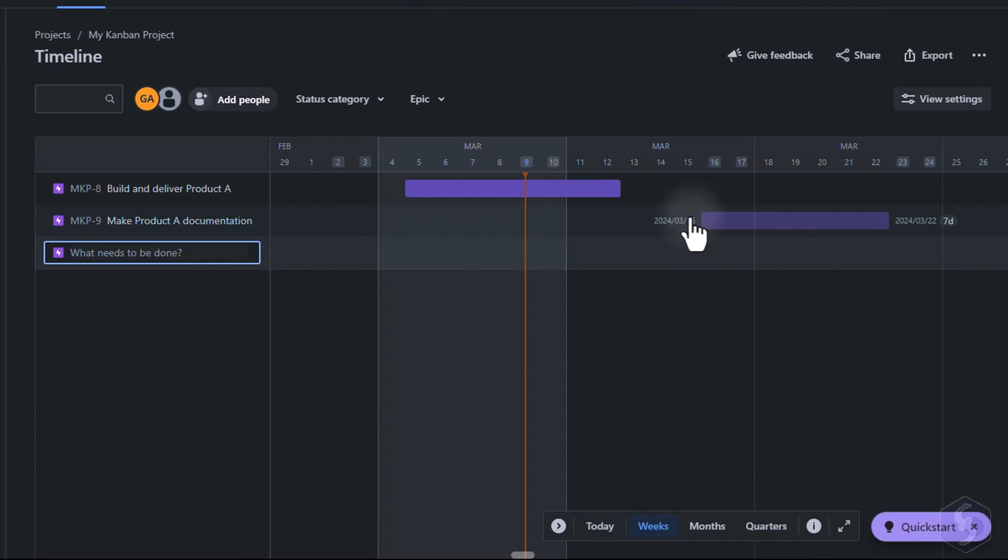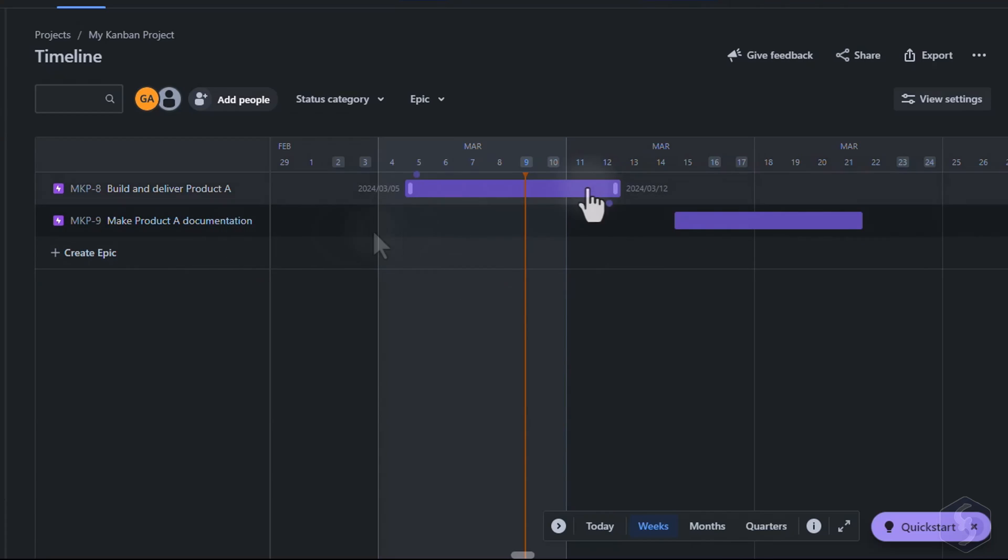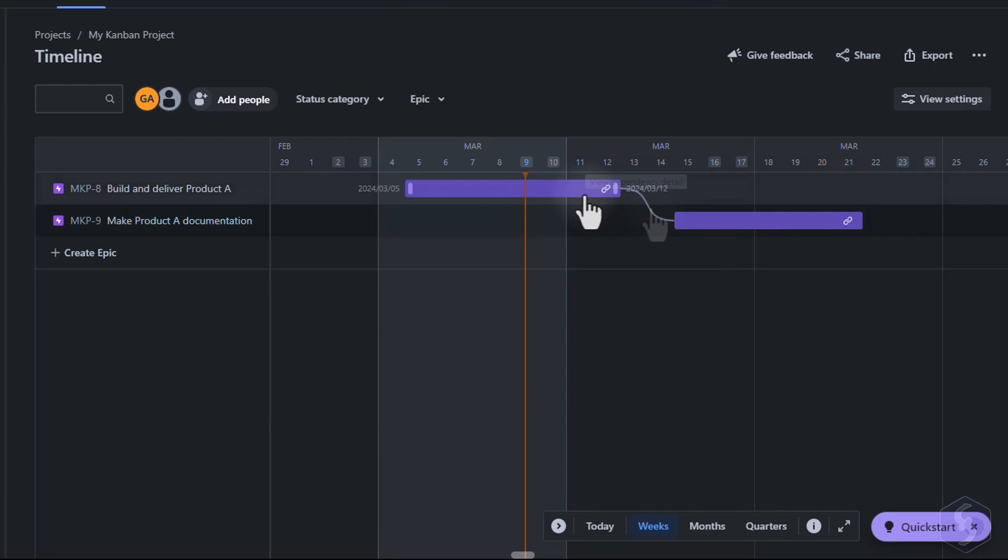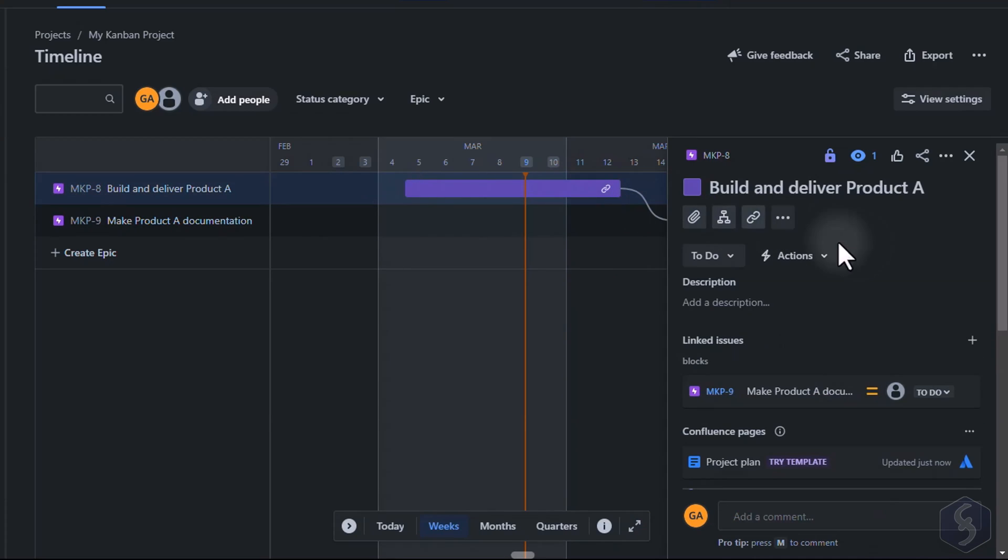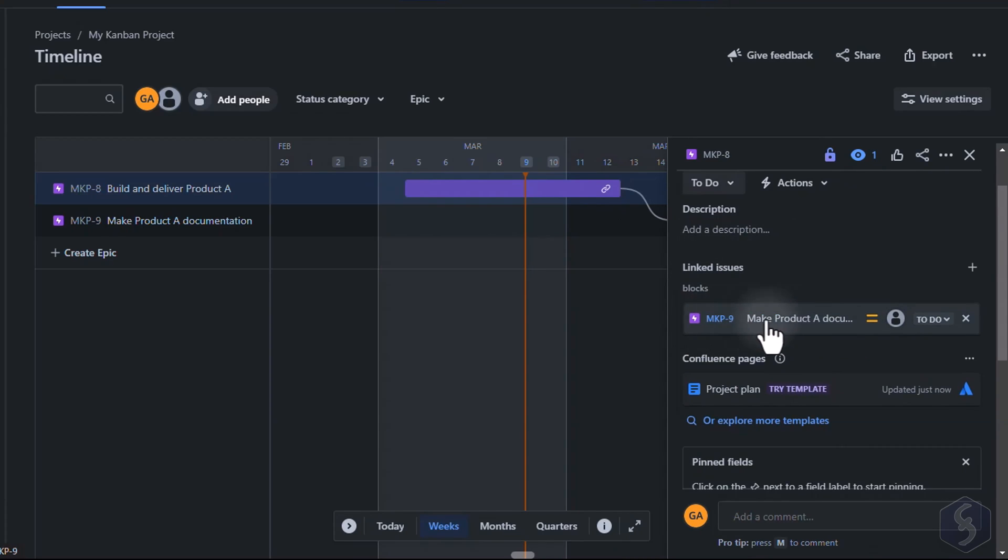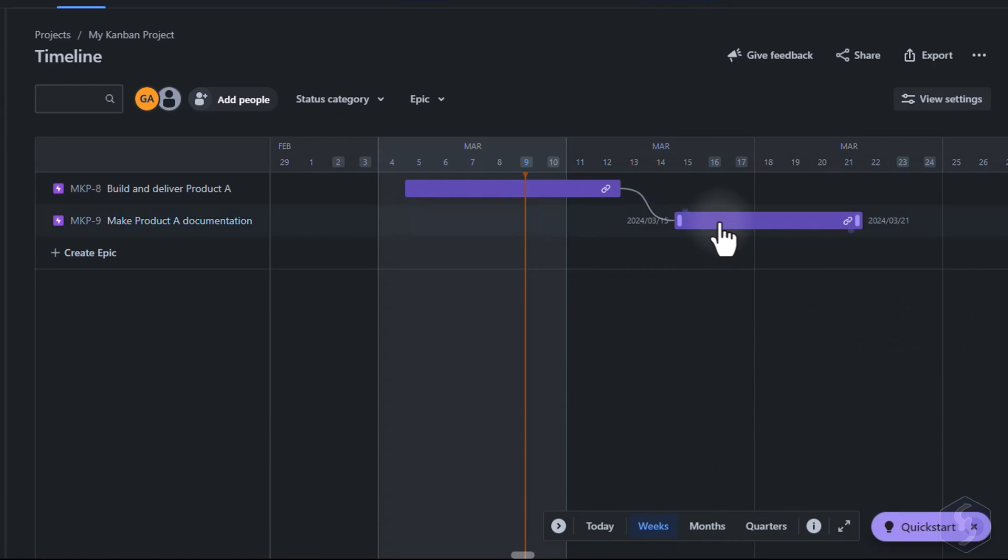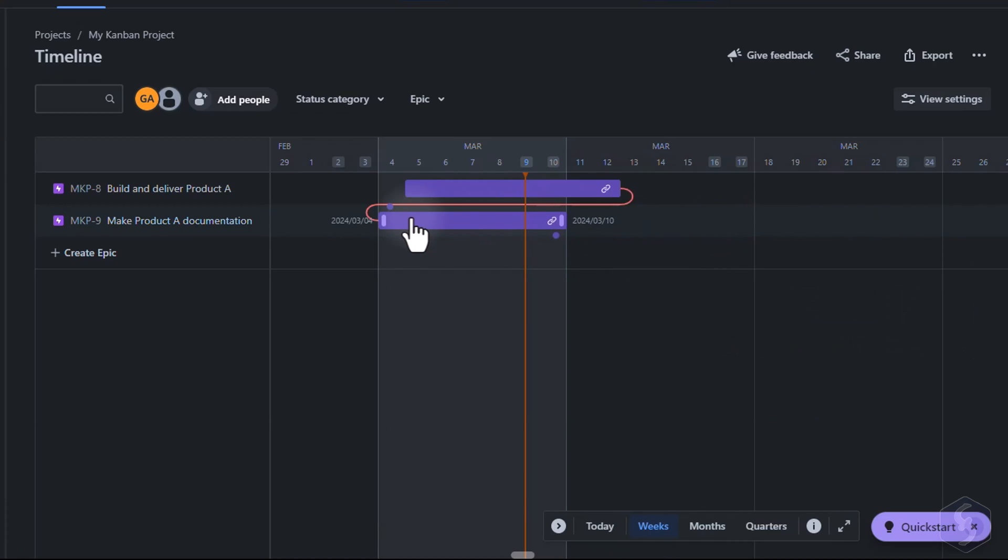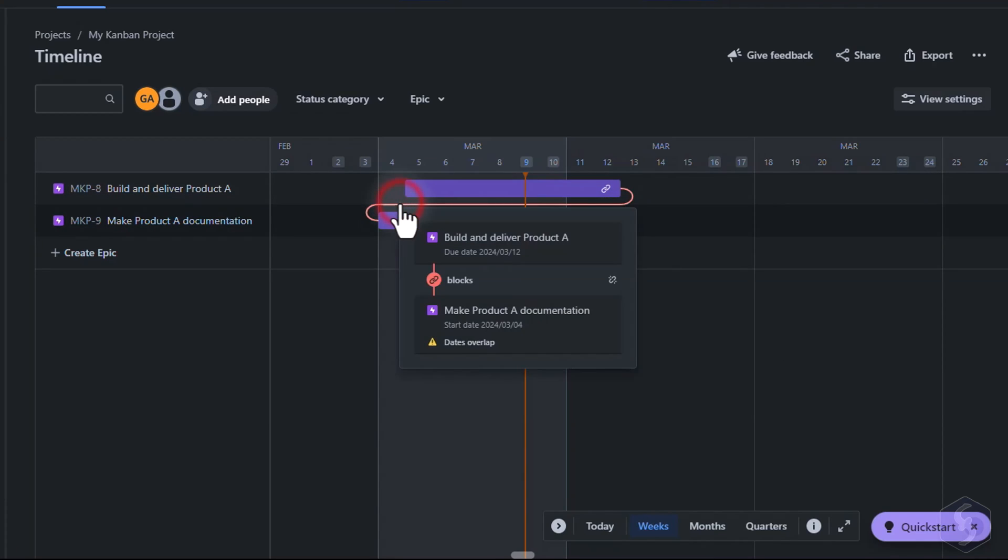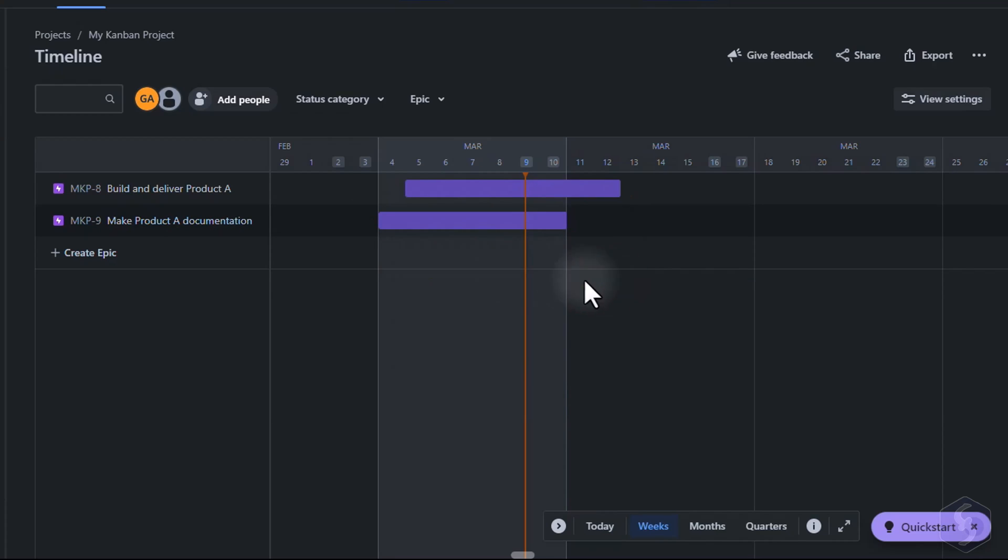You can also create dependencies between Epics by hovering over any edge and dragging the link icon on another block. These connections are also shown under Linked Issues when you open any Epic issue involved. If any connection becomes red the dependence is no more respected. Click on the link to get more details or remove the connection completely.